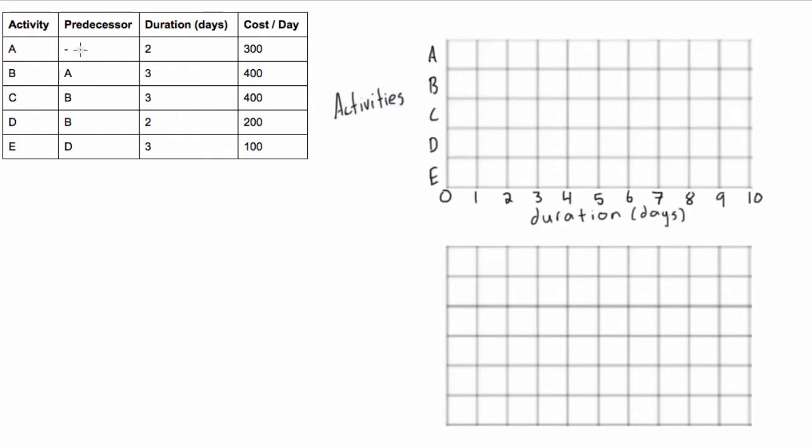So first of all we'll have activity A. It has no predecessor so that means it starts at the beginning of the project and it's two days long. So we're going to do that with a straight line, two days long and it will look like that, day one, day two.